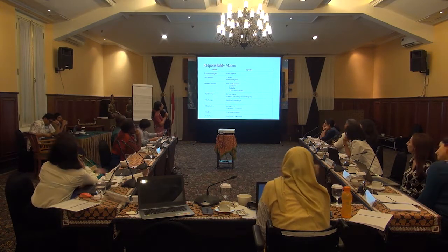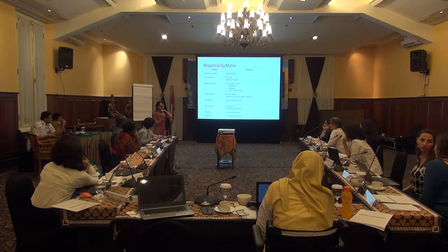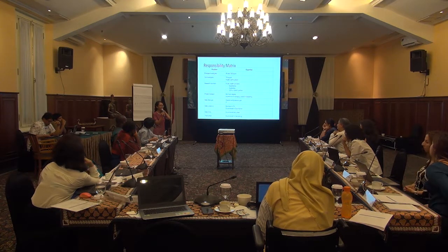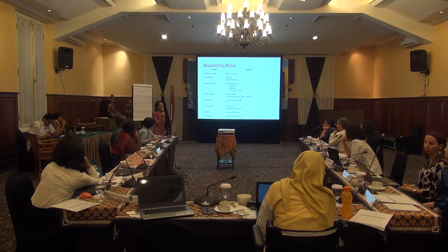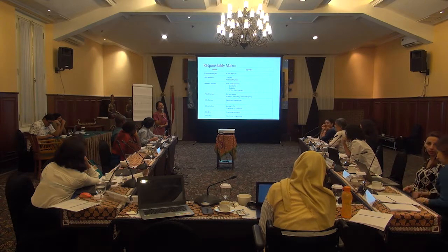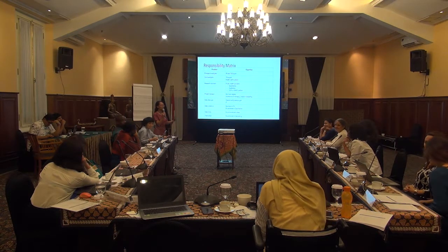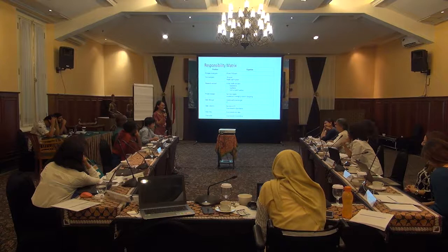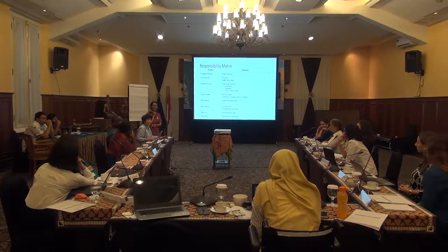So we put 1 month for completing the protocol, and also 3 months for the permission, because from the previous experience we got the ethical clearance in 2 months. So we put 3 months now. Probably we need to put more, but thank you for that. Are there other questions?